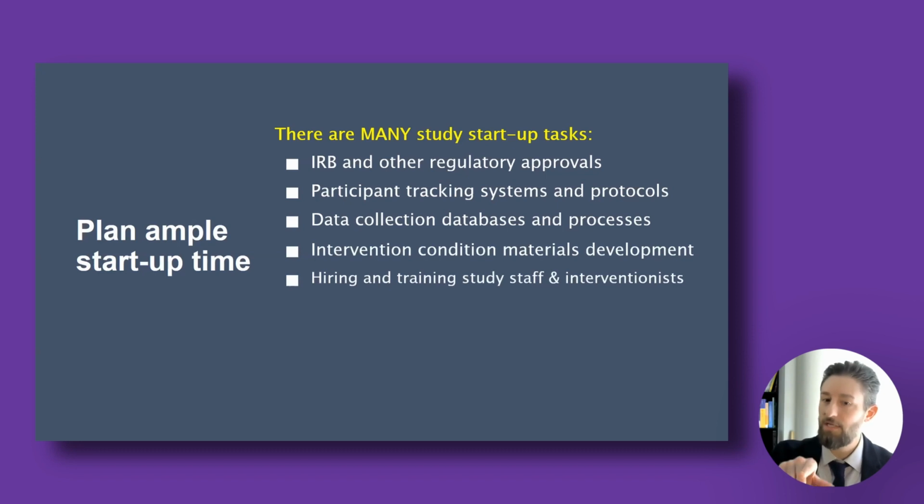For that data collection database, definitely test out randomization. You're going to want to make sure that you're very comfortable that when you upload those randomization lists, and we use REDCap, that they operate well, and that your project manager, whomever it is, isn't sweating bullets every time they push that randomization button. So I would definitely practice that a little bit. Hiring and training study staff and interventionists. Again, if you have a project manager and they've never done a factorial trial, it just takes a little bit more time to get them oriented.